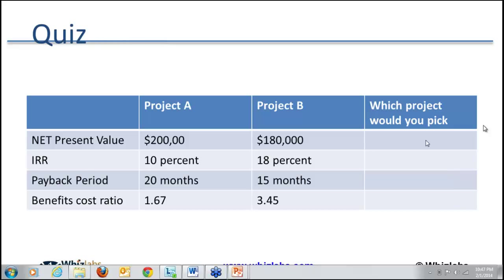You should not think about what money has already been spent on that particular project. So that sunk cost, the cost which has already been expended, may be double or maybe even thrice. But if the project still meets the objective and the other constraints, the project should continue. So that's the concept behind the strategic objective of the project. Definitely, cost is one of the important factors for a project to continue or not, but it should not be the sole factor to decide that.